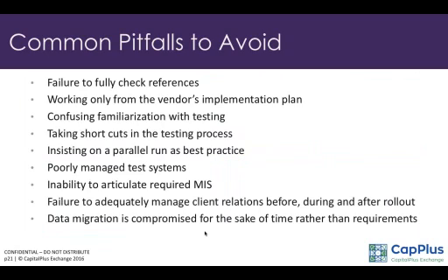But the way I would recommend you set up site visits is that you get a commitment that you can have one person for 3 hours, or one person for 2 hours in the morning and another person for 2 hours in the evening. You should talk to people in the front office as well as in the back office as well as in the management.